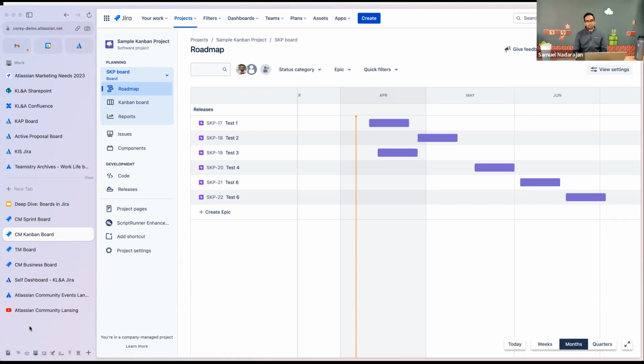Yeah, that's a good question about the roadmap. Unfortunately, that gap functionality is not supported unless you take a couple of fingers and put them on your bar to create an artificial gap, right? But in that case, you would have one continuous timeline. Yeah, because under the hood, when you are setting these schedules, you're really setting your start date and due date fields. So there are two fields being adjusted behind the scenes. I do appreciate the questions, and I've made a note internally about possibly doing roadmap functionality like that in the future.